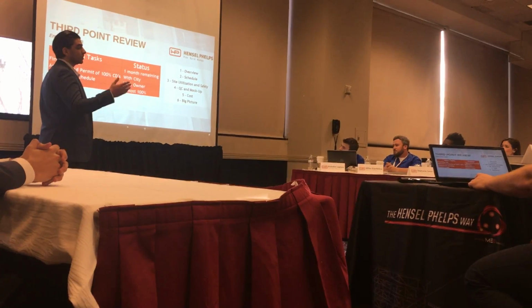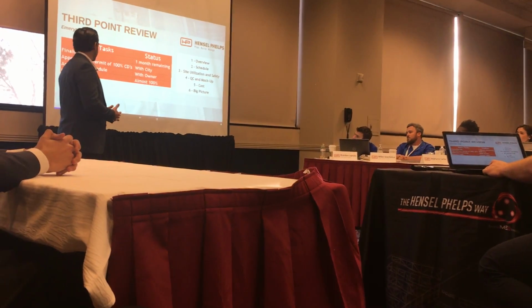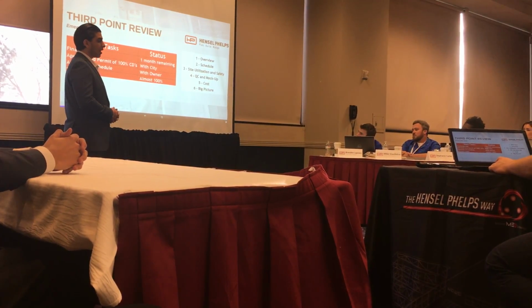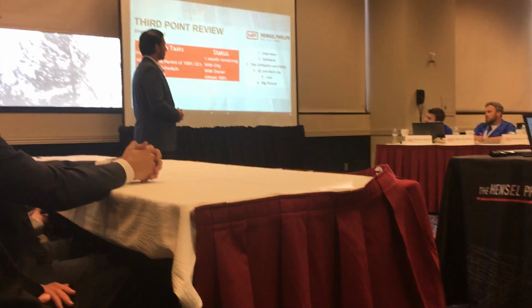Contractual obligation, we need to get the particular final completion and substantial completion dates that he or she approves of. And we're also completing our buyout. We're almost at 100% buyout, and that ties into our contingency selection for our buyout in the future.